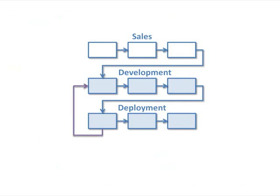This is basically what we mean by a value stream map — we're mapping how value is added. You can also notice those loop-backs. Technically, I'm measuring how many hours of work, but the actual value-added time would be lower because rejects and rework aren't really value-add. Value streams can be extremely valuable because they give us the big picture that we often don't see.